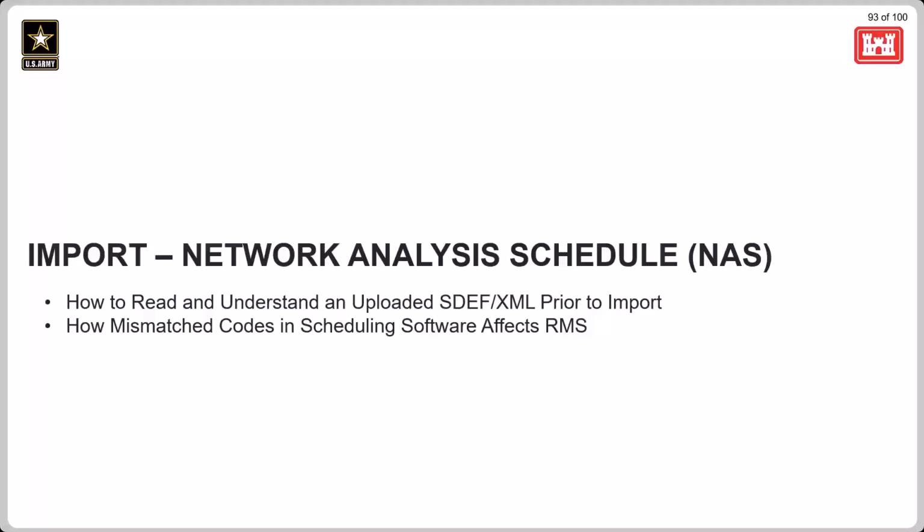We've included this information due to tickets we've seen arise at the help desk for users seeing negative numbers on progress payments after a schedule import, or with activities showing as having $0 when trying to import an invoice using the schedule, etc. This information can be used to update your users on how to properly approve an import and hopefully avoid these issues, or at least know how to resolve them if they do occur.